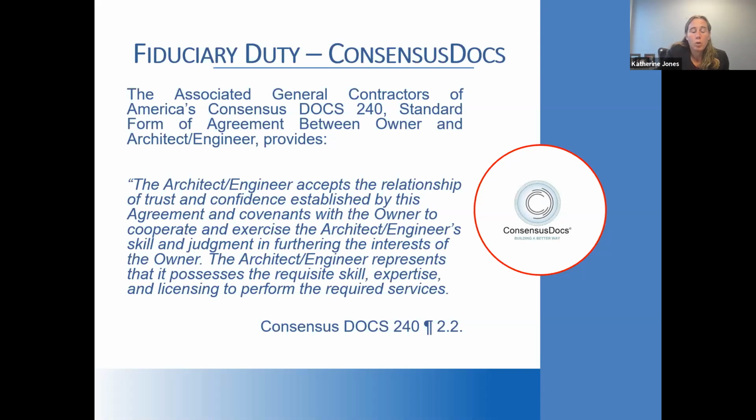When we look at this agreement, if you take out the words trust and confidence, I don't think you have anything other than just a standard duty. Some courts and a lot of lawyers will tell you that once you put in that the architect accepts the relationship of trust and confidence, that's starting to signal a fiduciary duty.